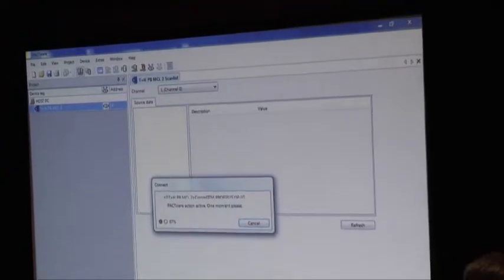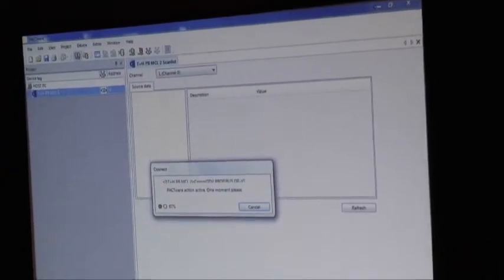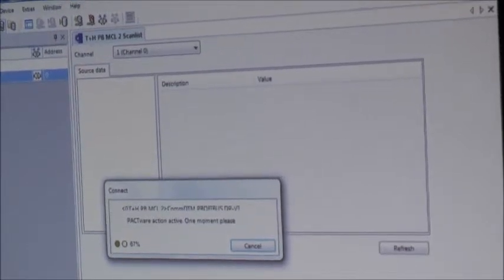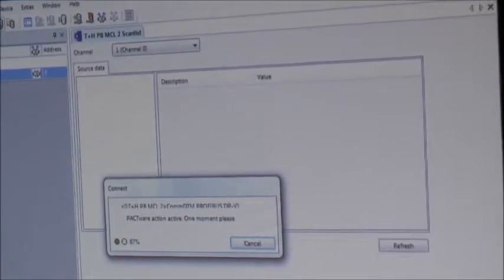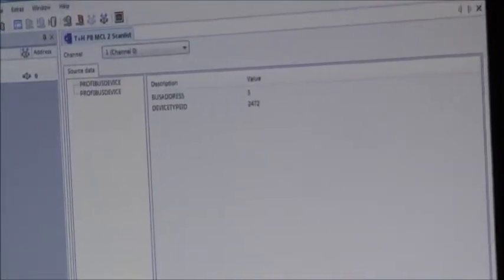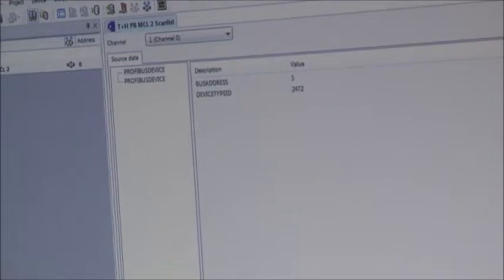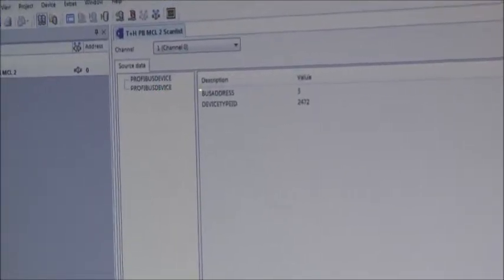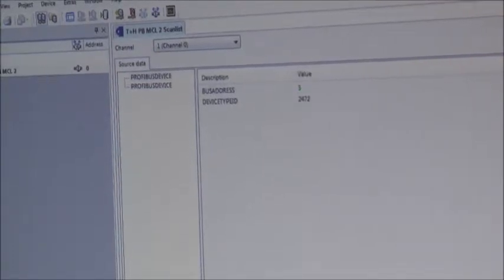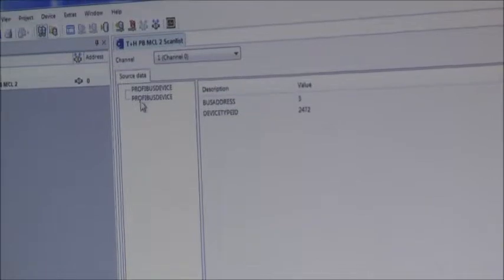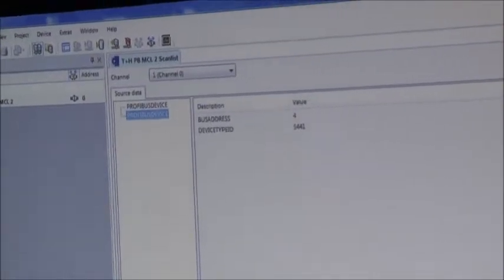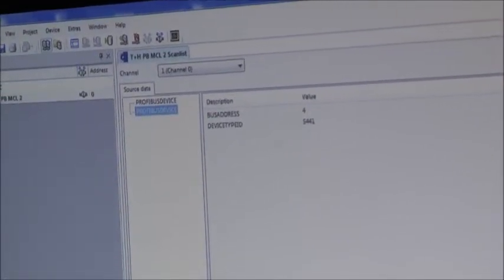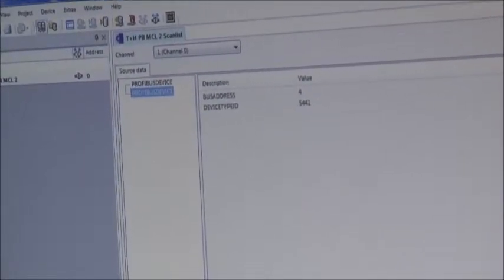I am going to check the scan. Now the device is looking for the Profibus participants connected in this network. So you have set the Profibus gateway to scan, not the switch. So we found two devices. We found one device with address 3 and we found another one with address 4. And this address 3 is now our segment coupler. It is one participant. And the next one is the pressure transmitter.